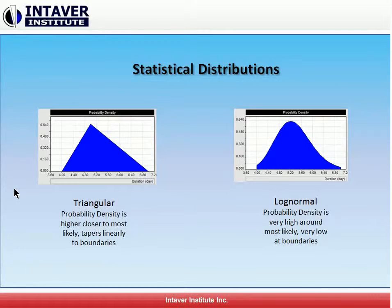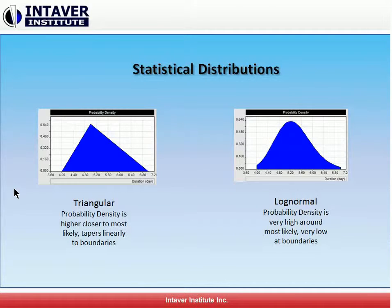Here we can see the triangular and log normal. Characteristically, schedule distributions are right-skewed with longer tails to the right. This is because in schedules, the ability to shorten the duration is limited, whereas there's really no limit to how much they could increase. Theoretically, an activity or a project could go on infinitely.